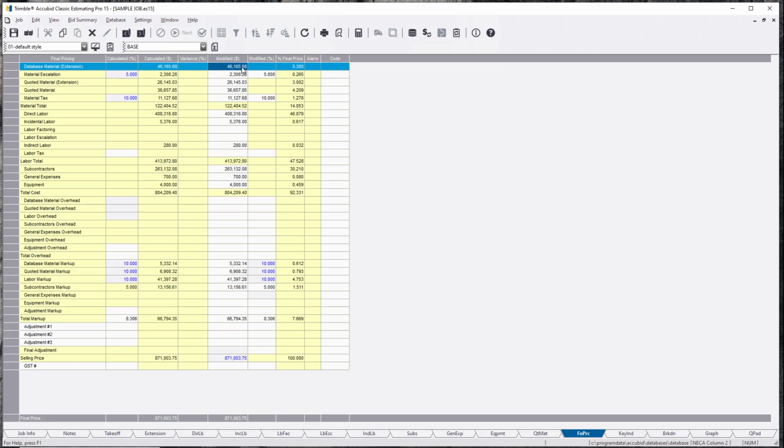So let's say I know I can get, you talk to your supply house. Say, hey, I got $46,000 in lighting controls and whatnot. So, can I get this 2% less right now, and you guys would be okay with that? And they say, yeah. Okay. So, let's say we could get this flat for $44,000.